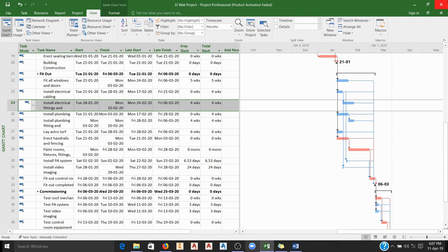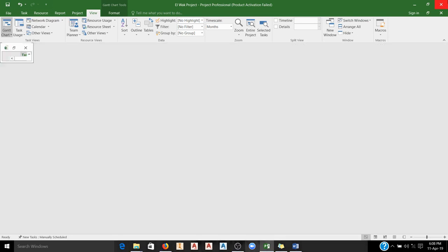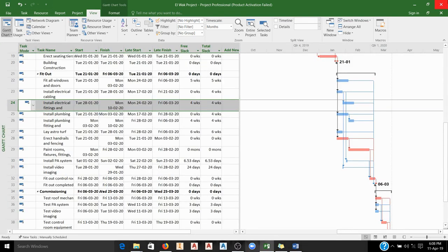Now we are writing it in the erect walls task and not in the pour concrete task, because this is the task that lags behind the predecessor. So erect walls lags behind its predecessor, which is the pouring of the concrete. So we will add the 5D to the lag column of our task erect walls.